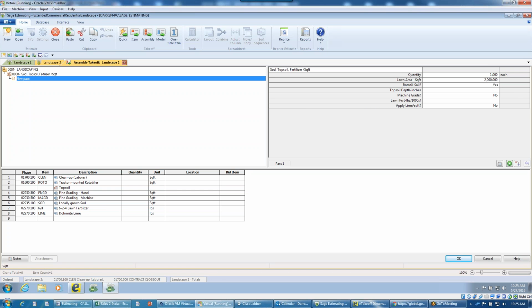So what we do is get the 3-way or 5-way soil and go over the top of it if we're doing sod. What's the depth, in inches, of what we're going to be putting out there? And is it going to be 3-way, 5-way, or a custom mix that we put together? So you get a list of those items rather than having them all just listed there and deleting the ones that aren't applicable to that particular job. We can build out these item tables, specifically tailored to your need, and enter them in here. If I say 3-way, it's going to pick the applicable 3-way soil mix out of the list of items we have down here, and of course calculate the quantity and the pricing.